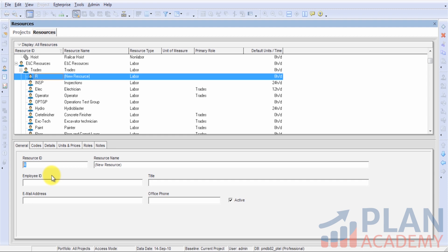I'm going to be adding a welder, so there's my welder resource ID. Now, resource ID is a unique field, meaning that you cannot have two resources with the same ID in Primavera. Usually that's not a problem.